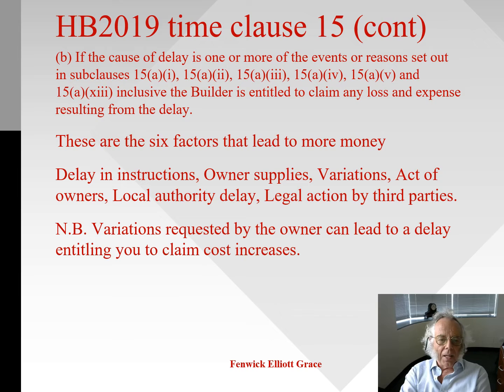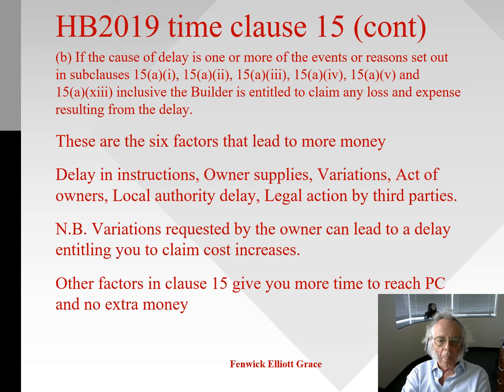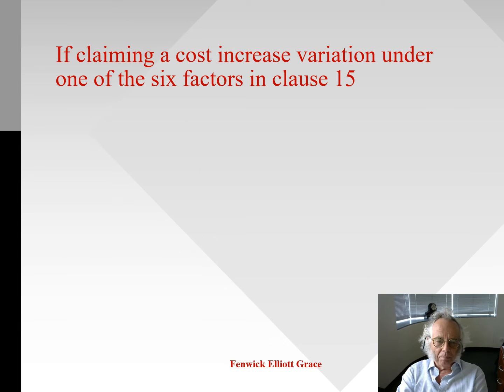Particularly note that where the owner asks for variations to the contract that have led to a delay, that might entitle you to claim cost increases. There are several other factors in clause 15 that give you more time to reach practical completion, but those factors don't give you extra money.